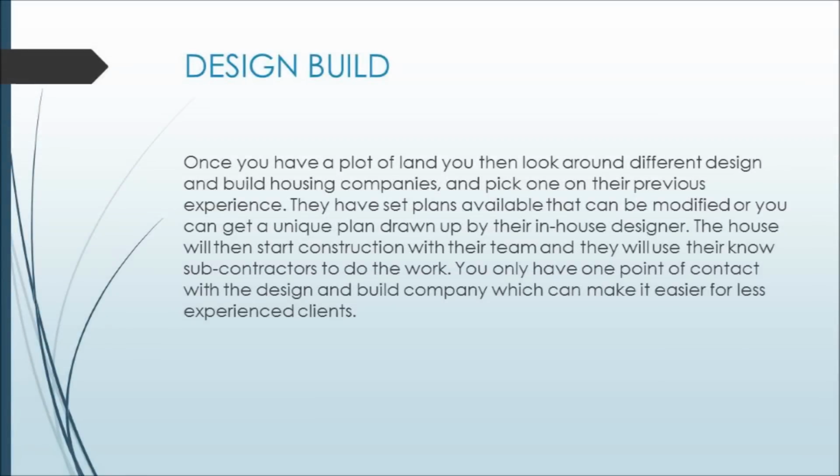The third method allows you to purchase your own section, and once you have bought your desired section, you can then go to a build contractor. Through them you would design the house that you desire for your section. The same company will also build your house, so you only have to deal with one company. They usually build these houses on a lump sum fixed price. This is good for you, as the contractor takes responsibility for the design and build of the project.